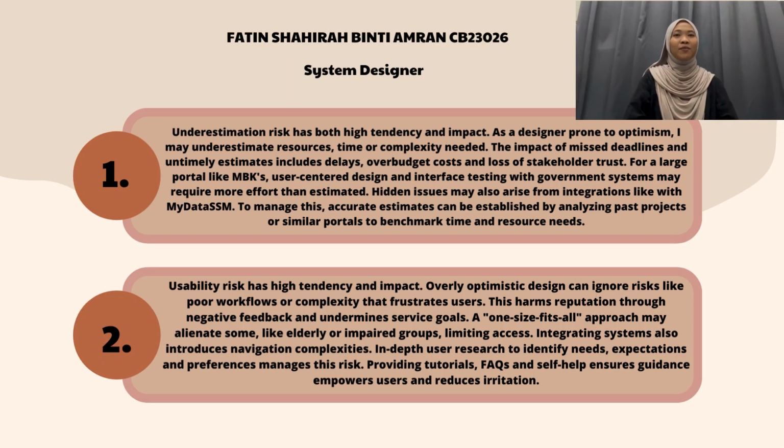Next, I'm going to explain my possible risks as a system designer. Underestimation risk is a big concern for me as a designer. Given my optimistic nature, I might unintentionally underestimate the time, resources, or complexity required. This can lead to missed deadlines, going over budget, and losing trust from stakeholders.